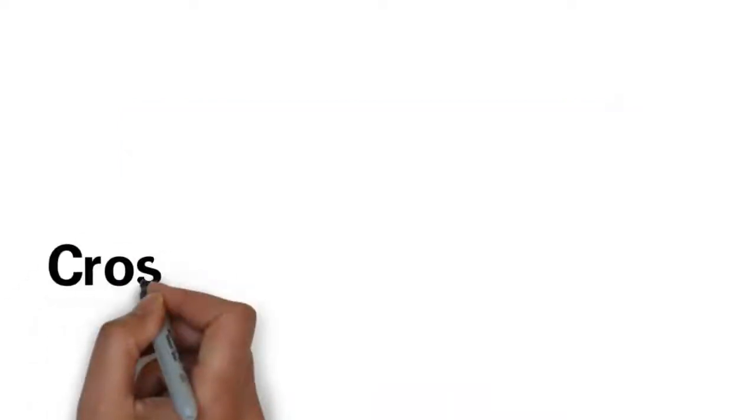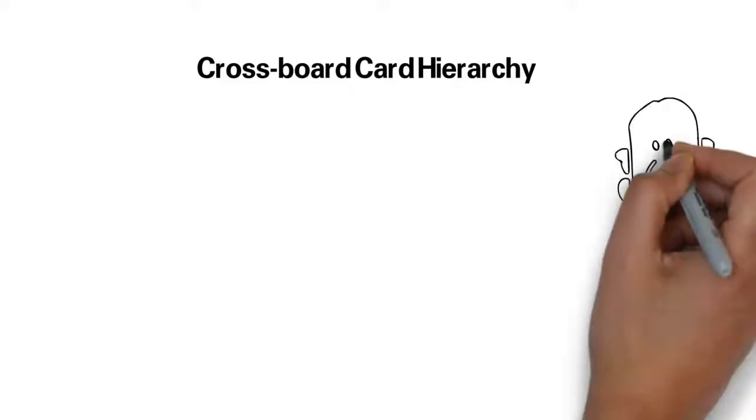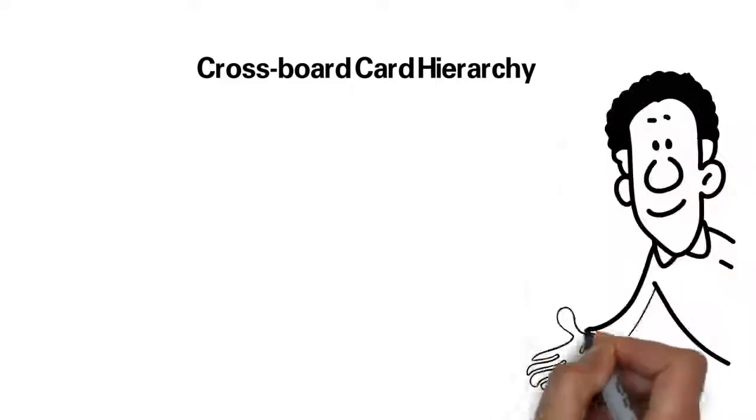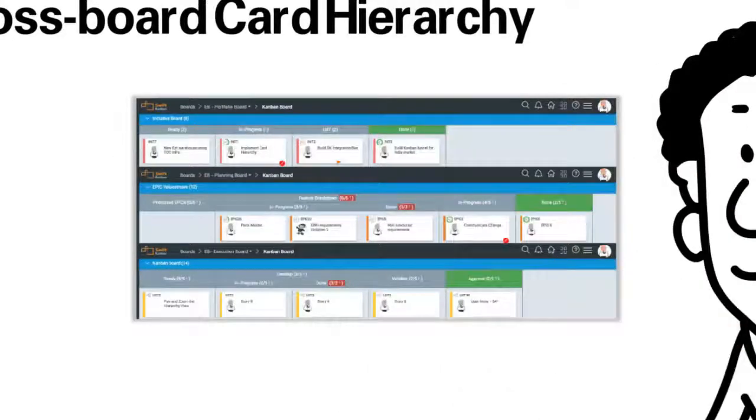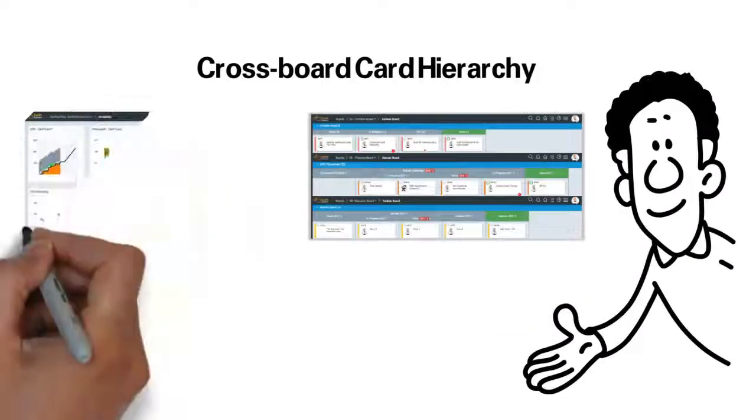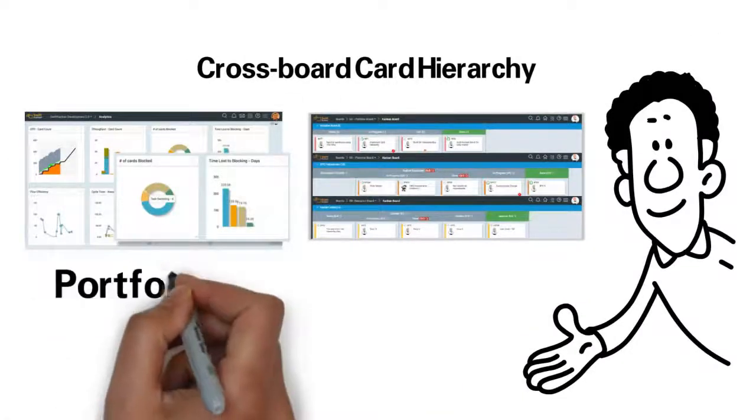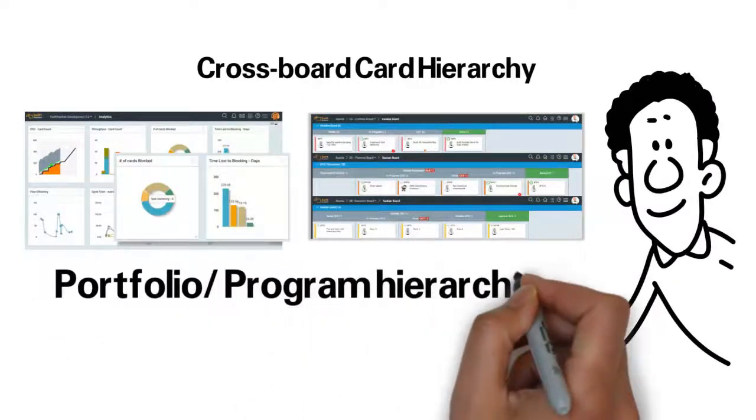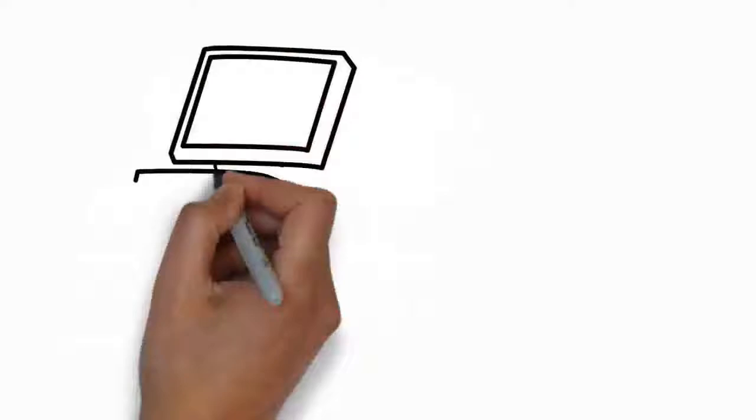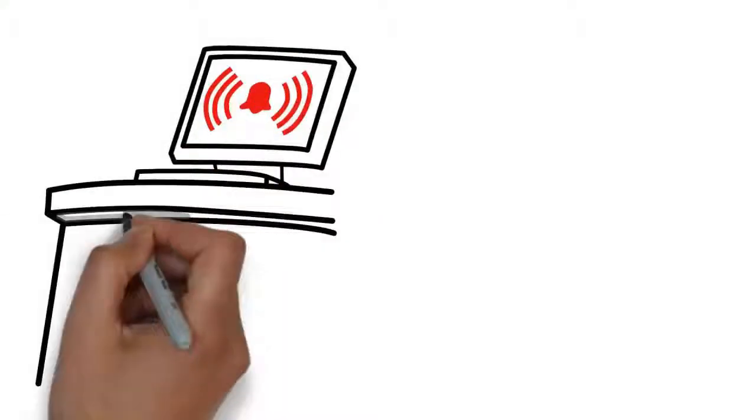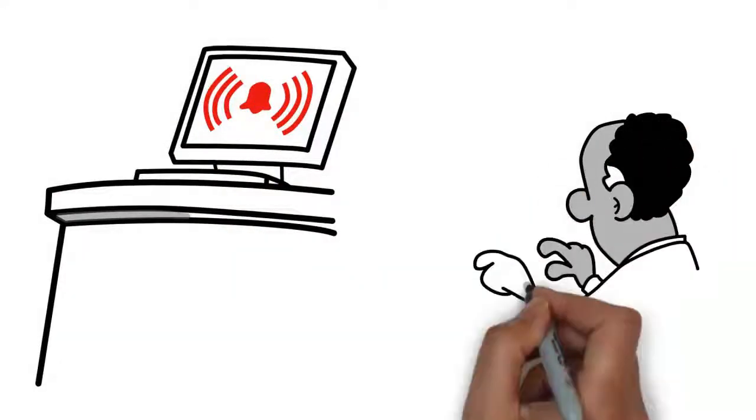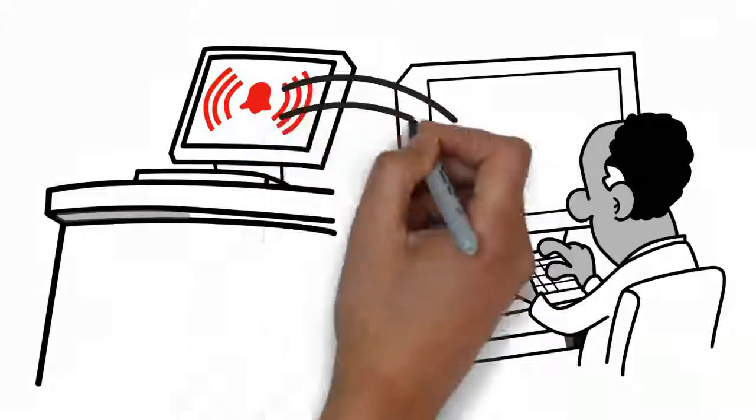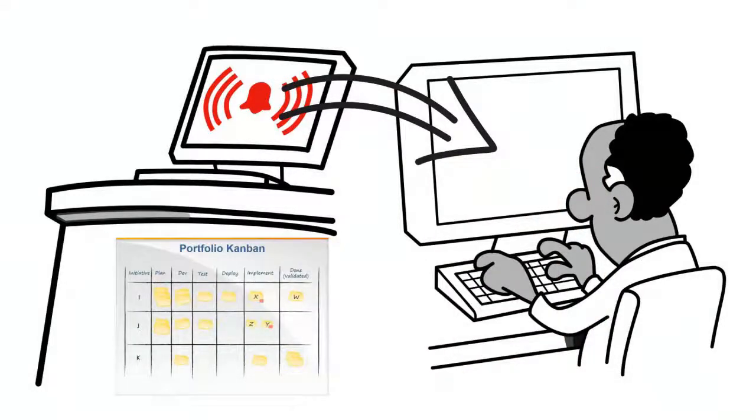Cross-board card hierarchy. Swift Kanban offers high flexibility in modeling different types of hierarchies across multiple Kanban boards, making it easy for you to model complex portfolio and program hierarchies. As progress automatically rolls up to parent-level cards, it provides an appropriate progress view and visual signals to stakeholders invited to the portfolio-level Kanban board.